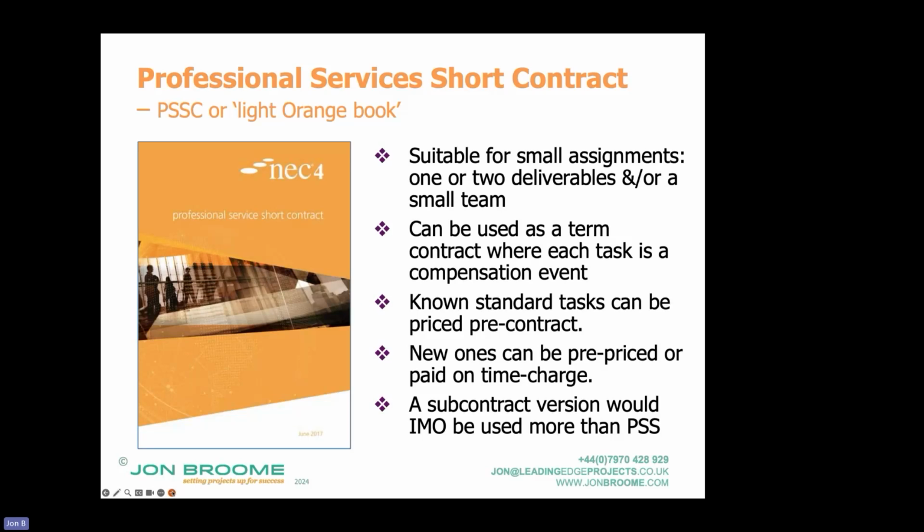If I instruct something and I can give you a clear enough scope about what I want you to do, we use those rates to come up with a lump sum, a fixed price for doing that task. So the consultant would go away and say, I think it's 10 hours times that rate, whatever it is. Or actually, I want you to do something and I'm not sure how much it's going to be or how long, what the scope is.